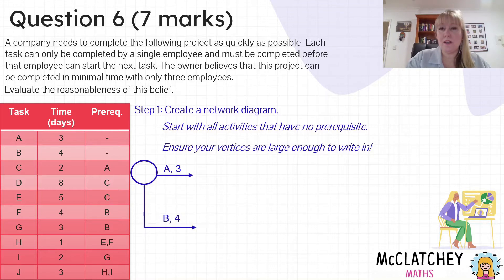A common mistake I also see students make is thinking that every activity needs its own vertex. Not correct. You have a starting vertex, a single starting vertex, and anything with no prerequisite comes from it. Remember, activities are on the edges.